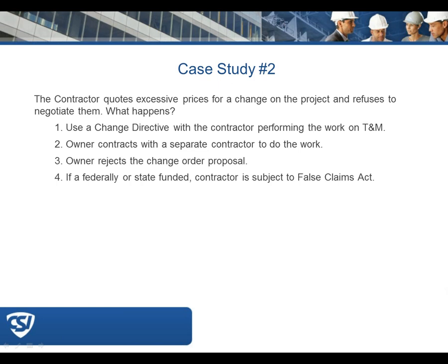When they sign that contract, they're agreeing to proceed with construction change directive work immediately, and not doing so would be a breach of contract. In terms of the owner rejecting that proposal, even though the architect recommends its approval, the owner obviously has the right to do that.